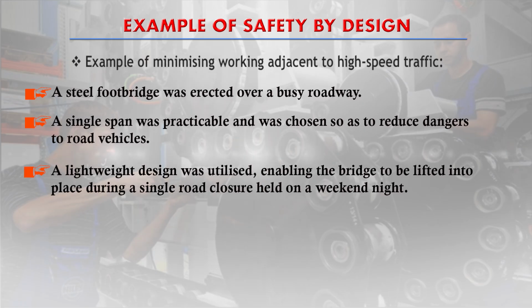A lightweight design was utilized, enabling the bridge to be lifted into place during a single road closure held on a weekend night. Due to this good design, this was possible without any exposure to the hazards.